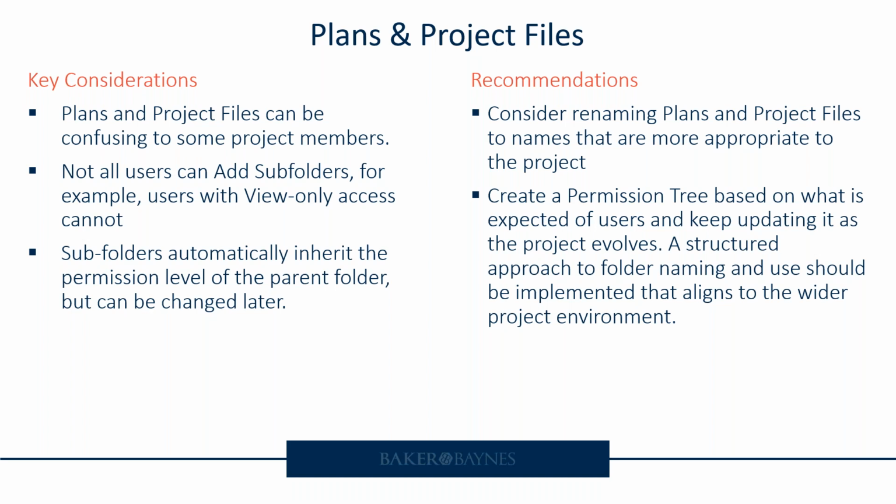From a recommendation point of view, like I've mentioned, consider renaming plans and project files so that the names are not as confusing. Project files are really everything that is not a plan or a drawing, and typically your plans and your drawings are usually shared in a shared or published state, not always in a work in progress state. And it's also useful to create a permission tree based on what is expected from everyone on the project before you start.